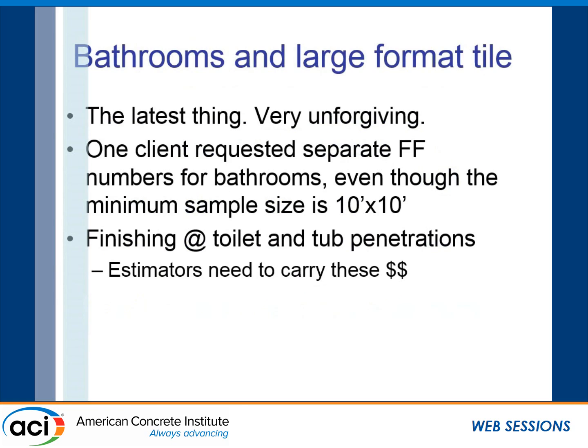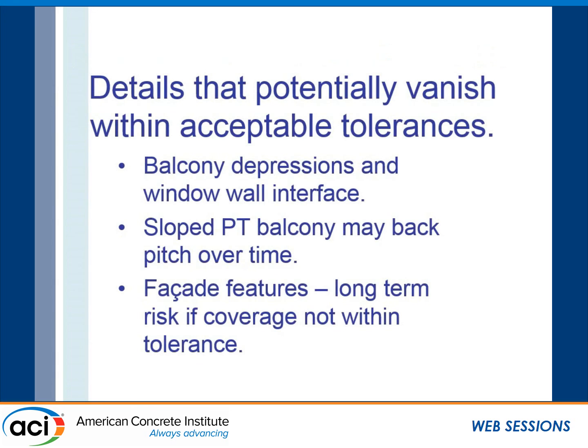Here's another challenge, a recent development: bathrooms have large format tile. You're going to get these large tile pieces that really have strict FF requirements. One client of ours requested separate FF numbers for bathrooms, even though the minimum sample size is 10 by 10. So they were asking something that was really out of bounds with the rules. And then finishing at the toilet and tub penetrations, our estimators need to carry these costs. Details that potentially vanish within acceptable tolerances.